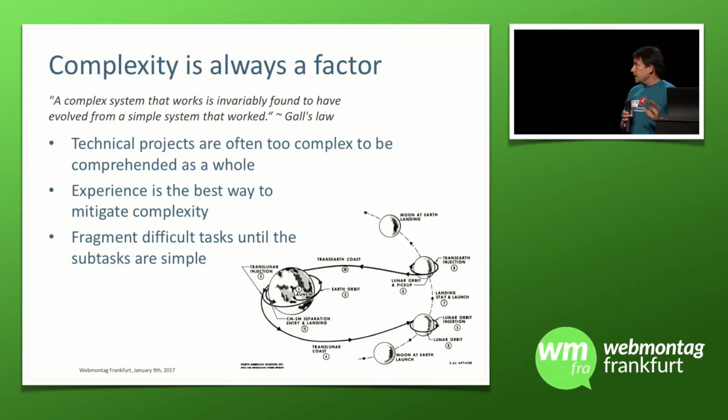It's not foolproof, it can mitigate the problems, but technical projects are often too complicated to be comprehended. Even experienced developers who know the project is complex might not understand the full level of complexity. So, the most important statement maybe in this entire presentation is to take complex tasks, understand that they're complex, admit to yourselves that they're complex, and break them down into pieces which are understandable. As soon as you've done that, you've taken the first step in having a project which can be accurately estimated.